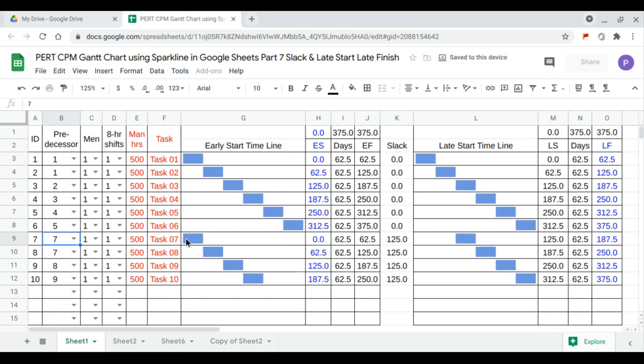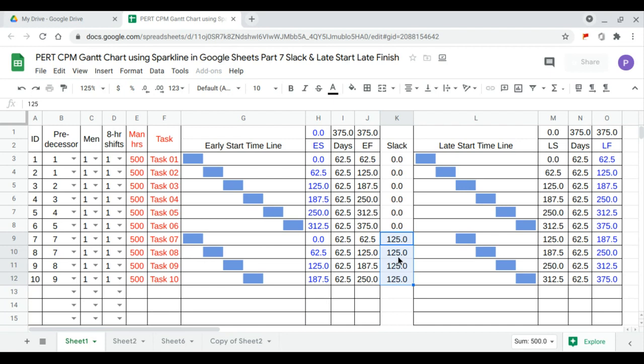So task 7 starts at day 0 and we'll have 7 to 10, we'll have a slack, 125 days, meaning this task can delay their starting period or start day by 125 days.